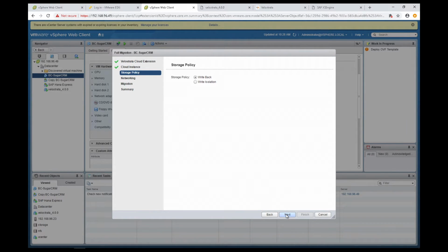Write back means that when you move your application to the cloud, while running in the cloud, if you need to roll back, or if you're trying to fix something on the fly, do you want to extend your outage window, or do you want to quickly roll back, fix the issue, and then schedule it on time, right? Because the change control window is critical for business, right? So we can roll back easily with all the changes in place, so you don't have to do manual syncing of data and so on and so forth.